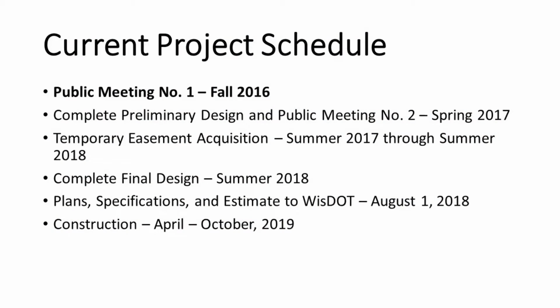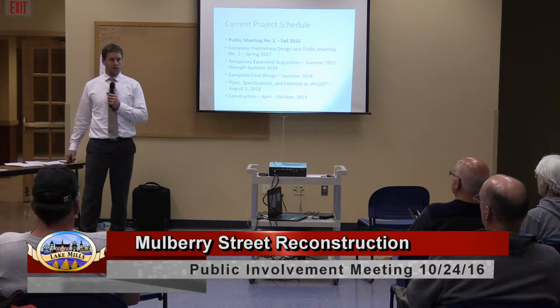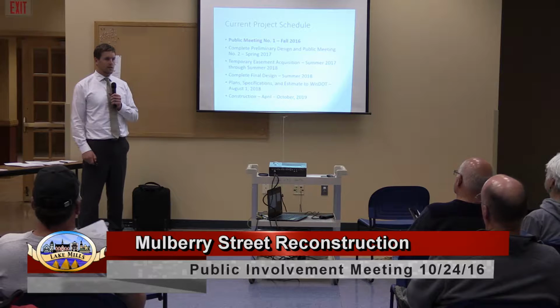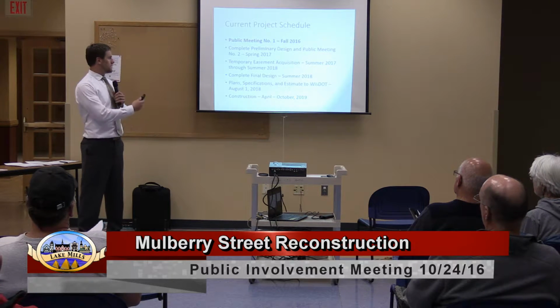The current schedule, this is public information meeting number 1. Preliminary design and public information meeting number 2 will be complete in 2017, spring 2017. We'll take your comments and concerns from this meeting. Any other things that you mail in, we have forms over here that you can mail in comments later. My card is here along with Matt. Our information is on the back of the information sheet that you can feel free to call or email, send in any comments after this, but we'll be looking to incorporate comments that we receive into our design for the